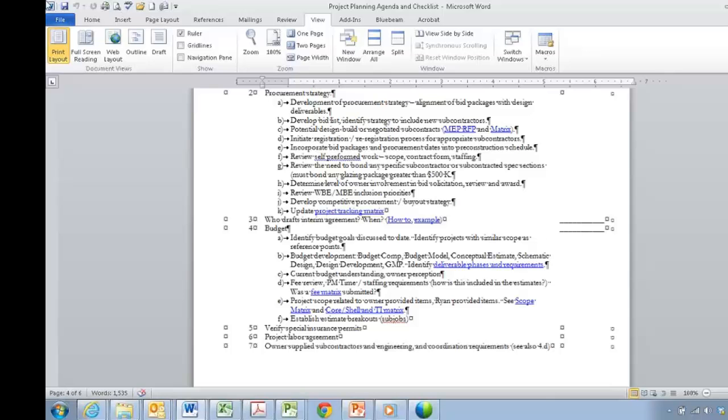This is also a time of looking at the budget to consider our cost intelligence. How do we want to break it down? What's going to be valuable for us going back into our historical efforts, both in terms of sub-jobs, the old break out the garage separate from the building, and the TI, stuff like that. Establish those strategies at the outset of the job, and it'll make everything easier going forward, and there'll be no go back on those work efforts.